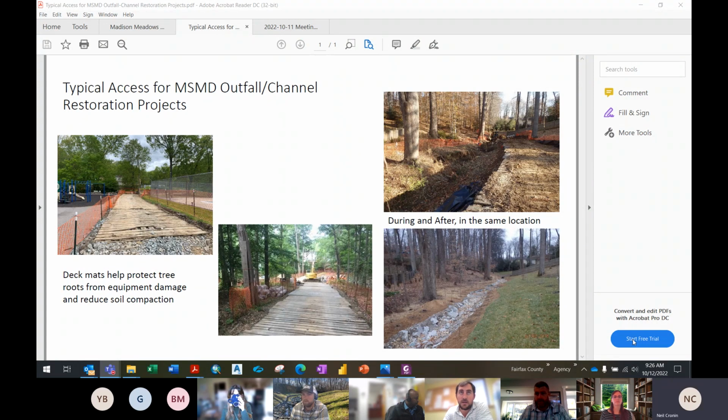The reason is that on a lot of projects, you have dump trucks taking fill material, like on big developments, driving over the existing dirt and soil on site. So they're tracking mud back towards the VDOT right of way or back towards your neighborhood. In this case, with the way we implement the deck matting, trucks making deliveries are not going to be tracking in dirt like they would on a normal construction site.